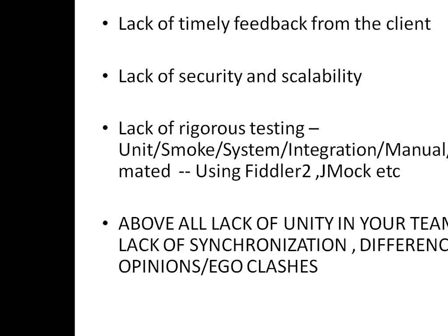Lack of timely feedback from the client. See, most of the time we say that the client is not giving feedback because we are not showing the progress to the client. See, unless I show the progress to the client, how can he give the comment or the feedback? Okay, it's a recursive cycle. Show to the client, get the feedback, improve. Show to the client, get the feedback, improve. And then you will be successful.